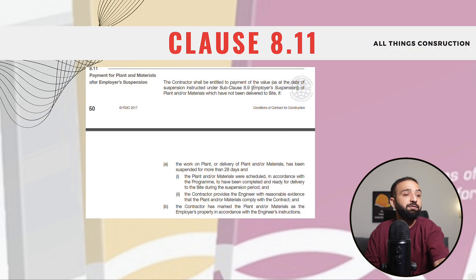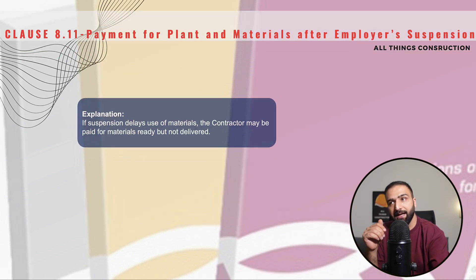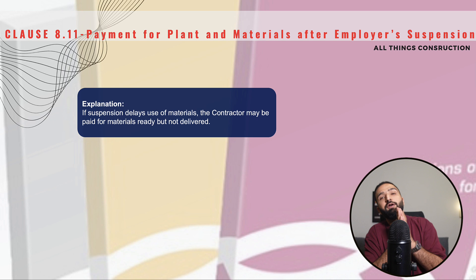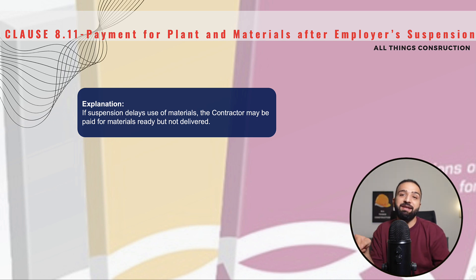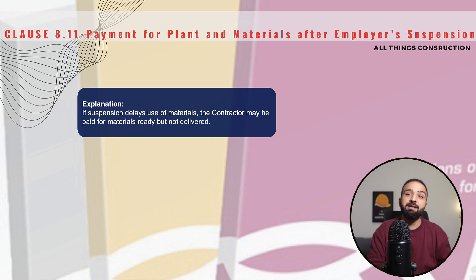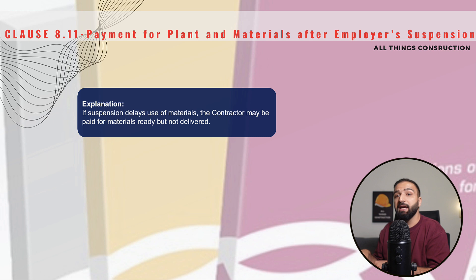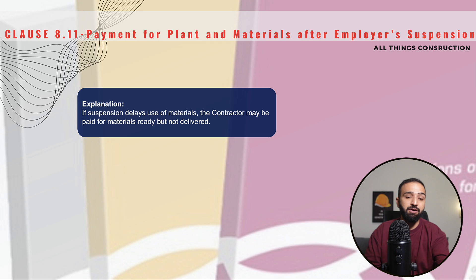Clause 8.11 is Payment for Plant and Materials after Employer's Suspension — a slightly tricky clause. For example, we had ordered all of the materials for the ceiling that we just discussed, and the ceiling design has changed. We will be entitled to the costs we have actually paid for the existing ceiling materials. The suspension of the works does not relieve the employer from his duty to pay us for costs incurred — even if the materials are not delivered to site, even if the order is placed and the materials are already produced in the factory, we will be entitled to recover these costs.